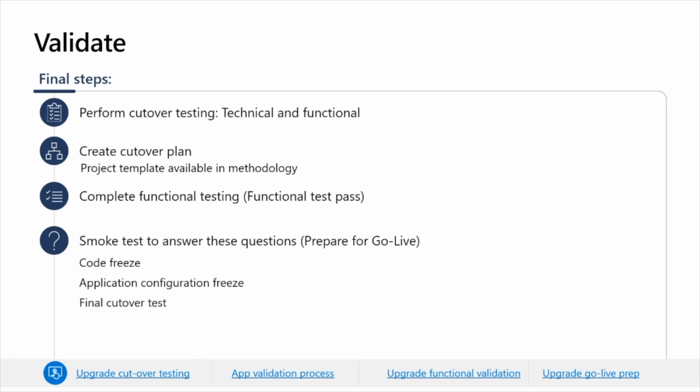Functional work stream. After data upgrade, several configuration tasks will be required in the FNO environment. All these tasks must be documented and quantified, and a resource must be assigned to them, because they must fit together with the technical tasks within the business downtime limit.